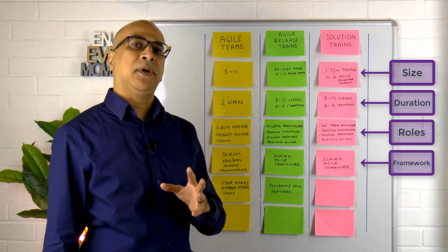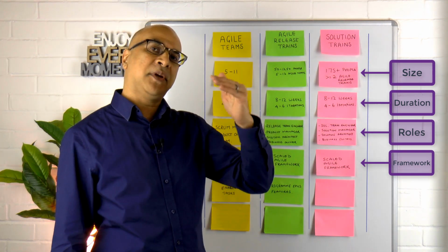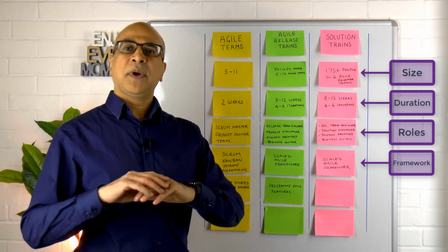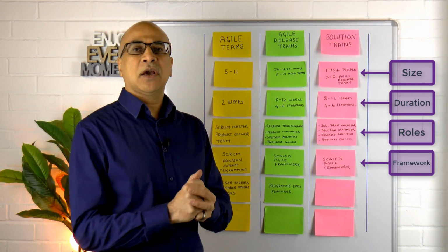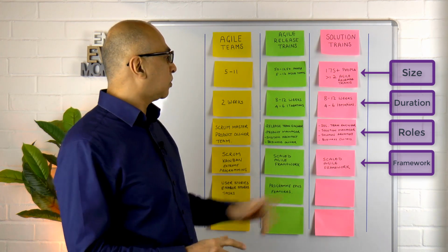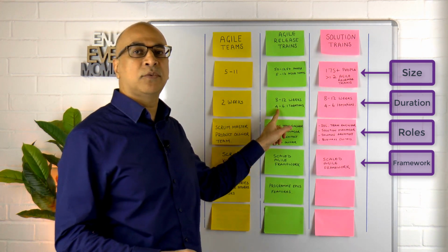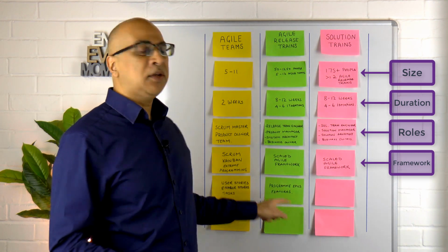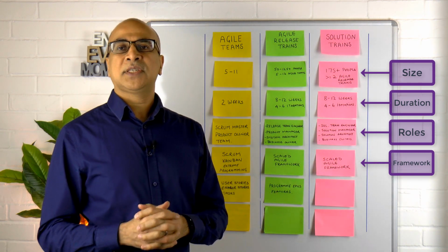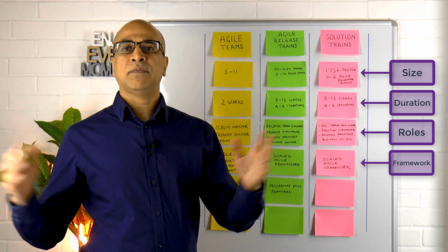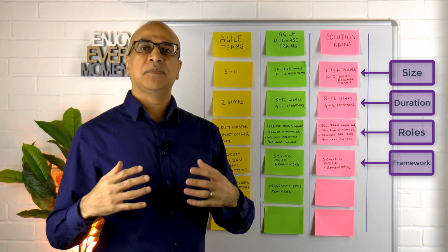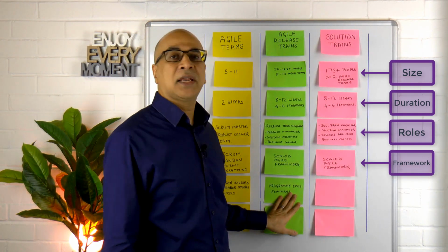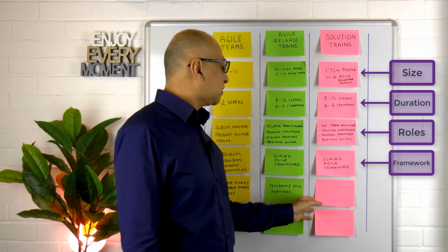You've got program epics. So you've got epics at multiple levels within Scaled Agile. So you can have program epics that span longer than a program increment. Remember, we talked about the program increment being between 8 to 12 weeks. So you've got to make sure that your feature fits in within 8 to 12 weeks. If it doesn't, then you can put together a program epic, which then needs to be split out. And because we need delivery within that quarter, that is where we use the features.